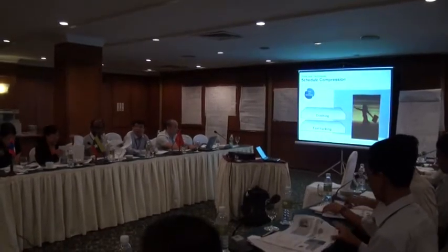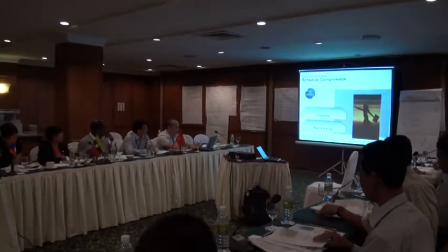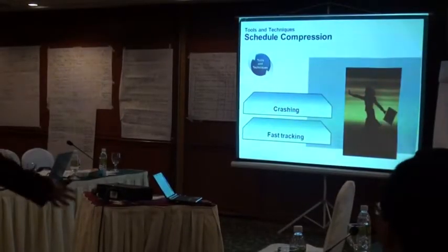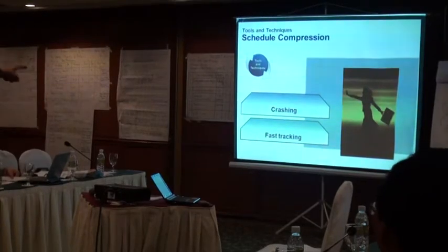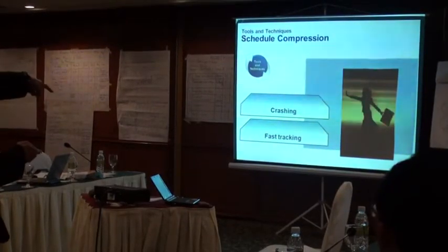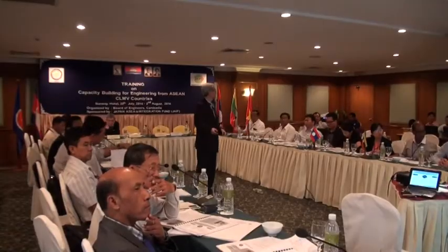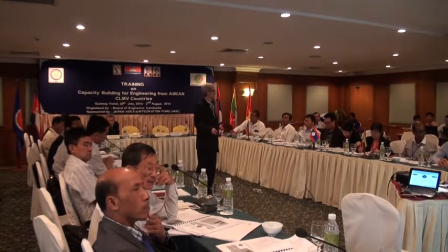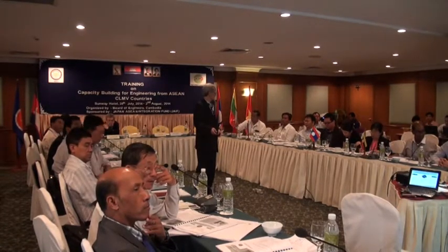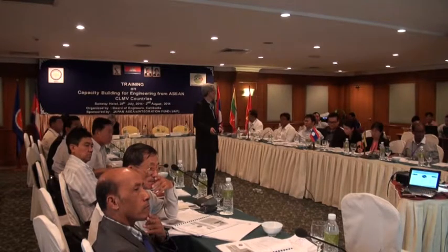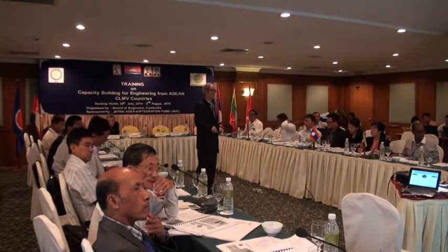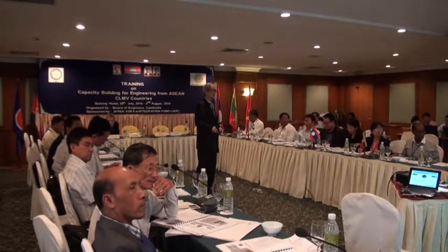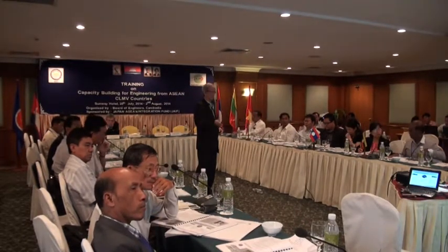So now you do compression. Compression technique. You must compress, make it shorter, faster. So you need techniques like crashing and fast tracking. Then forecast the future if you can come up with the information. In a lot of projects, because of delay, they have to forecast a new date. Not too often, but a new date must come up. So a change request comes out, then you update the information. These are all updated.